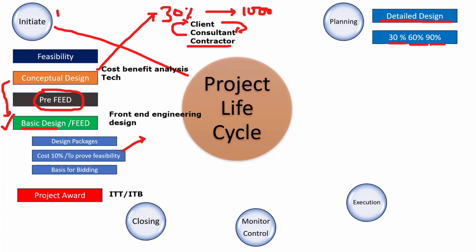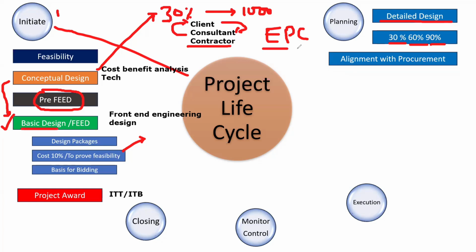I'm going to guide you people with respect to different kinds of milestones. And then alignment with procurement. Okay, alignment with procurement when design. Of course, I told you EPC. What does EPC mean? Engineering, procurement, and construction. You are going to align each phase with another: engineering with procurement and procurement with construction. So alignment with procurement, finding the dependency model, and then project schedule.